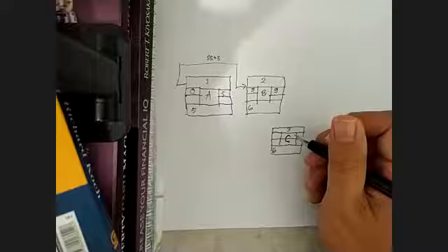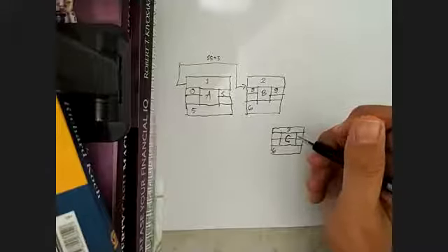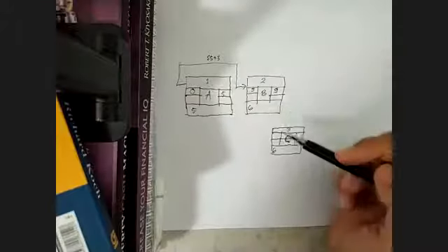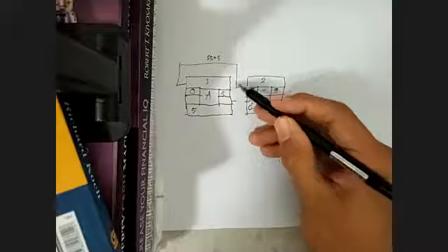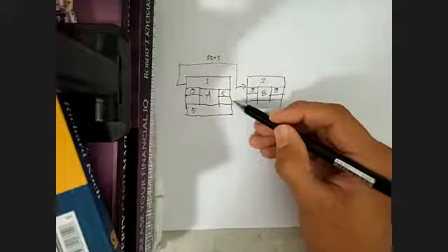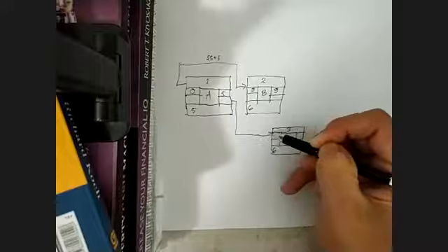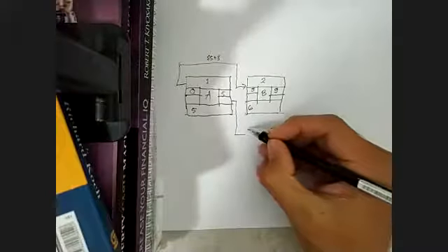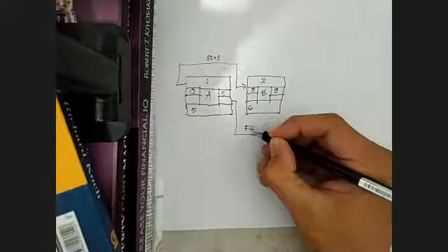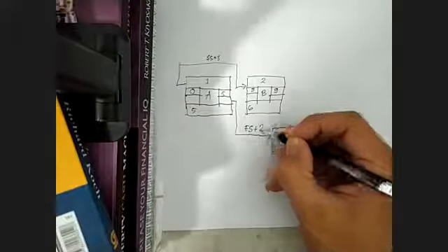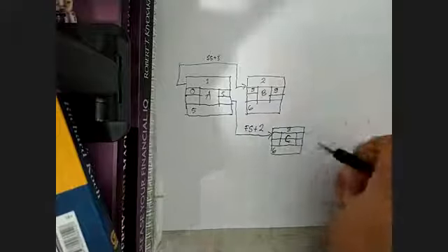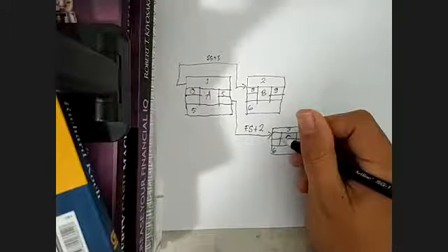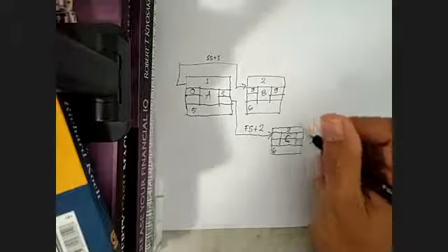So what we will do now: the activity C has the constraint or predecessor finish to start from number 1 into number 3. Finish to start means that this arrow comes from the right side of number 1, since it is a finish, and the arrow should be on the left side. That's what we call finish to start with the lag 2. This is the area of finish. This is the area of start for the activity C. We cannot directly fill the blank over here. We should draw all the arrows.